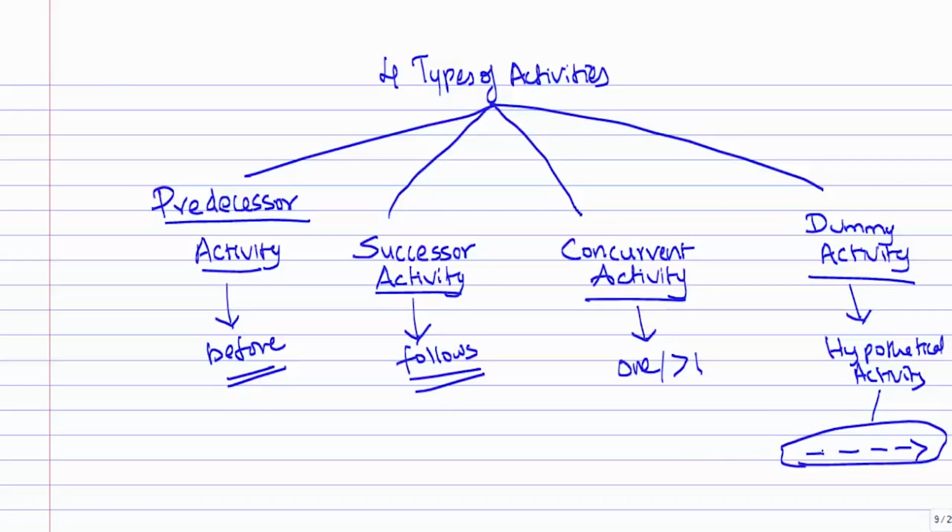Why is this activity introduced? It is introduced basically to clarify the activity pattern, and there may be some scenarios which call for introducing dummy activities. Scenario 1 can be to make the activities with common starting and finishing points more distinguishable. You would take effort to make the starting and finishing points distinguishable, and in those scenarios you can have this dummy activity.